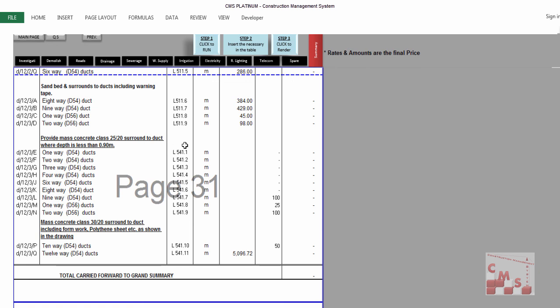That's how CMS is dealing with infrastructure and gives you a full ready POQ. You will just insert the quantities directly in it, and when you are working in the cost estimation, you will add your rate including your overhead and profit.